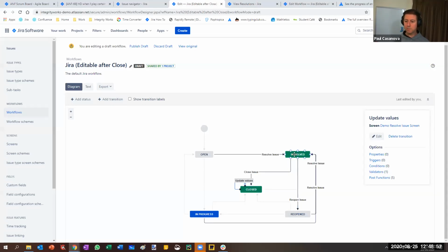So the green boxes indicate that something is resolved at that point. Now, generally the only green box is the done status in a workflow. And quite often people add workflow statuses of in review, in testing, approved, different things like that, to try and satisfy that need. It raises a really good point that workflows are there to be customized.